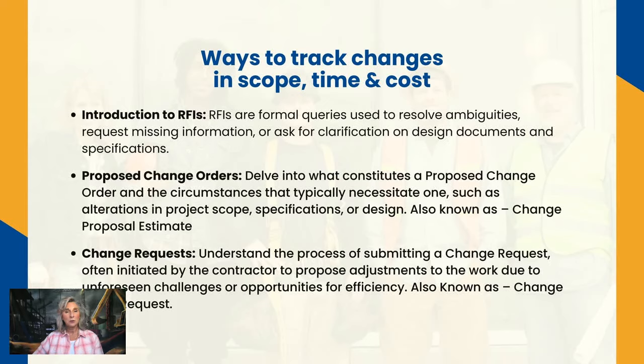And so the architect will come back and provide a response to the clarification requested by the contractor. Now, in that response, it typically has the potential of identifying a cost or a time change. So that's when there's going to be a proposed change order submitted by the contractor.